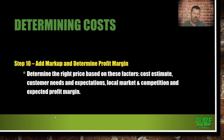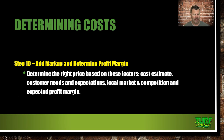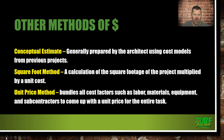Add markup and determine your profit margin based on your cost estimate, customer needs and expectations, the local market, your competition, and your expected profit margin. Hopefully we never have to bid against someone who'd do it for zero just to keep you from getting the job. Other methods of estimating include a conceptual estimate, generally prepared by the architect using cost models from previous projects.